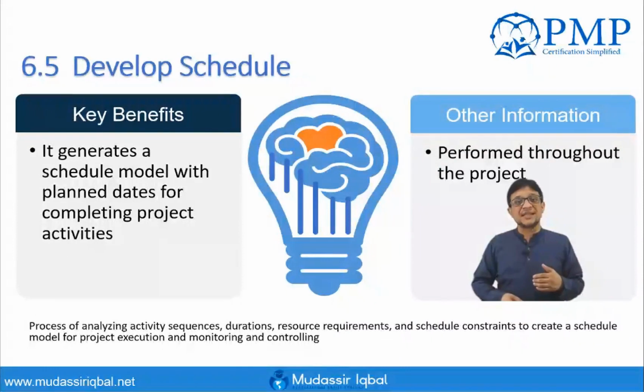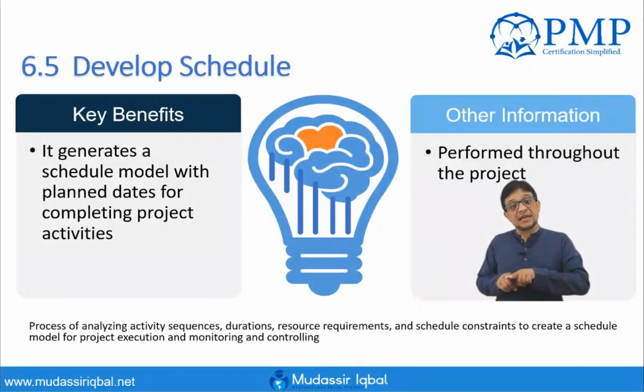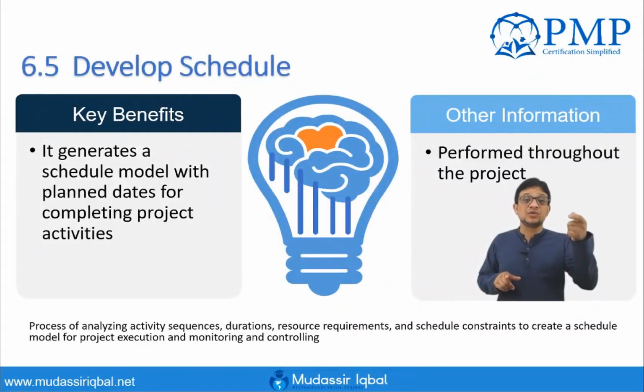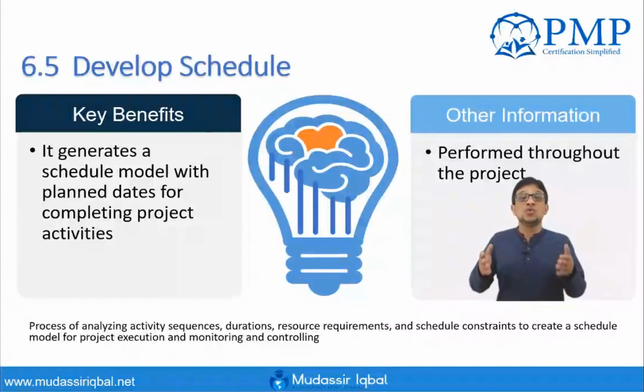The most important constraint that we usually receive from outside of the project is an end date. Whatever schedule you have made has to be directly linked with the benefits management plan, because all the deliveries and all the milestones have to be directly linked with the benefits management plan, to see if the deliverable is delivering the value that you have agreed as part of the plan, which is also your responsibility, to deliver value to the organization. This is where I conclude the introduction of develop schedule.